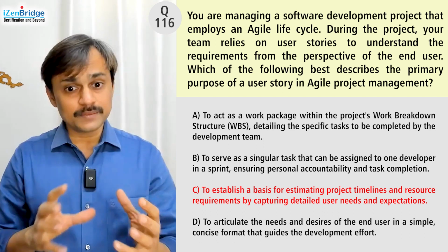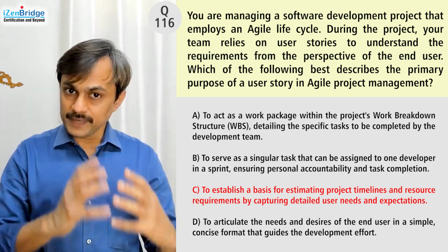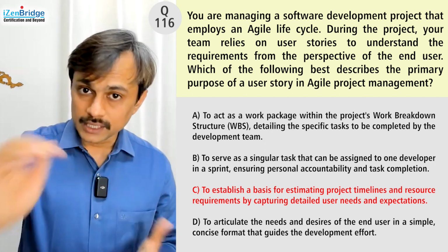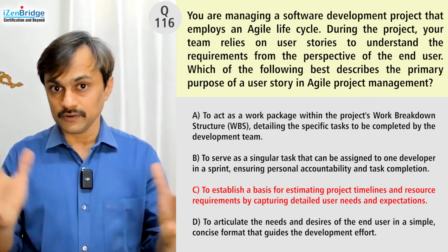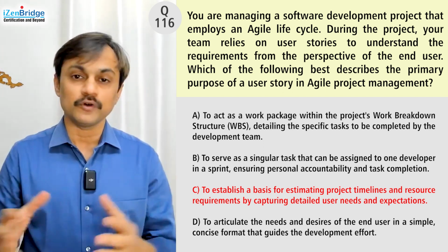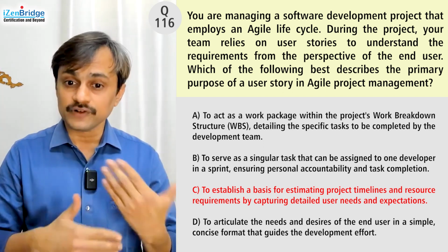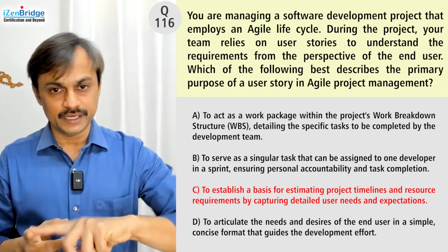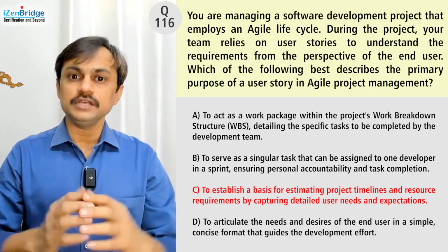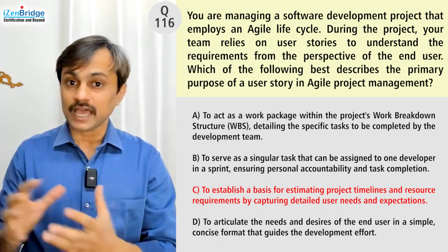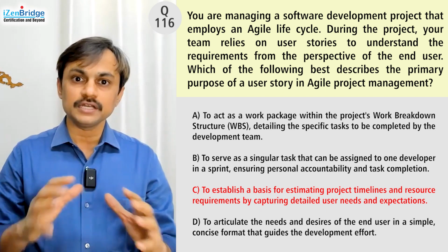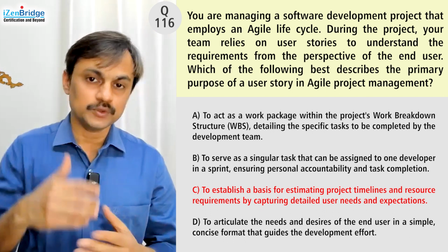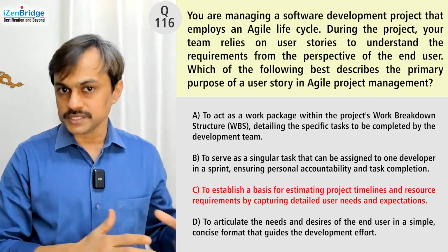So it has some elements which might be possible, because we may estimate user stories in story points based on our team velocity. We may predict the release duration and the scope of that particular release. But these things may get further elaborated, and these things are not used to calculate and identify who all will be needed. The capacity of the team, or the type of skills we need, are usually predicted based on the nature of work, rather than looking at all the user stories and then coming to a resource requirement. So I can ignore option C as well.